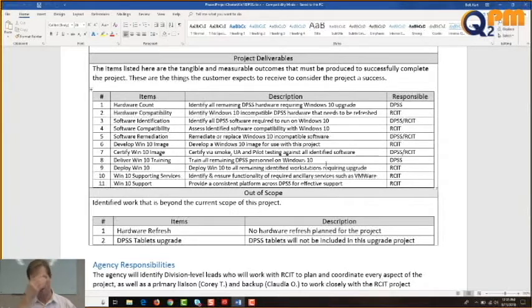Was there any testing involved in the hardware refresh, or wasn't in the original testing? Yes, that's a very good point. We agreed to replicate the test protocols that we had in the first case. It was much shorter in this case because the testing we had done on the other had not revealed any serious problems. So we agreed to a much truncated one, I think it was 6 weeks. Did you spin off a new project for that? No, we didn't. We incorporated it into the current project, and we're actually doing that right now. Is it like a change order or something? Yeah, there is a change.